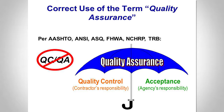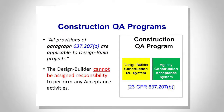Again, pointing out in construction, the same issues apply. Quality assurance is the umbrella; contractor quality control covers the product. Notice that the design builder cannot be assigned responsibility to perform any acceptance activities. You can use the contractor's information as part of your acceptance, but the contractor cannot make the acceptance determination.